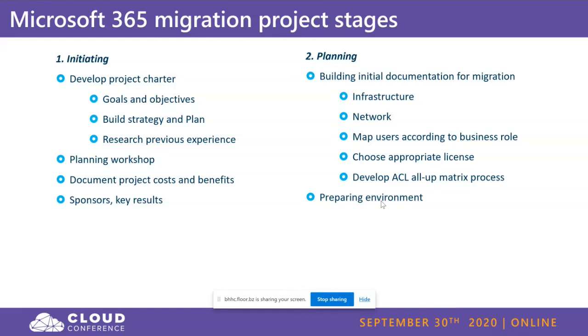So it's very, very important to make an assessment of the infrastructure, the patches, the operating system, the server, and the workload. Also, one of the most important things is to look at the limitations for Exchange Online, for example, or for SharePoint, Teams, or OneDrive, to understand if our existing infrastructure or solution will work in Office 365 or Microsoft 365. So it's very important to document everything and look at the details.